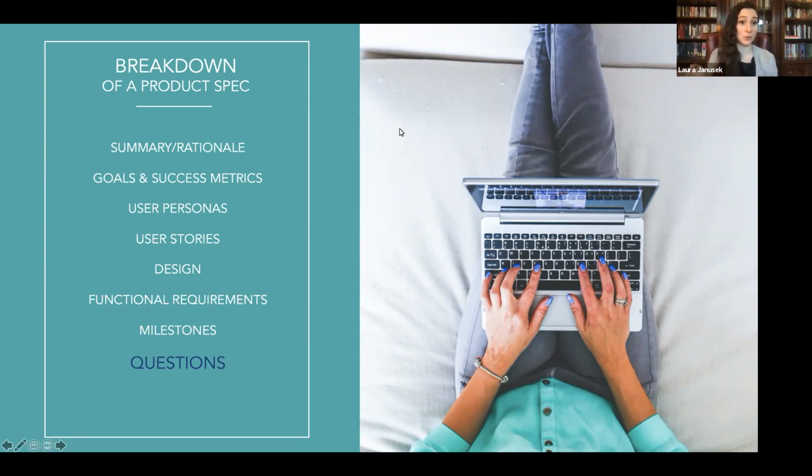And then dev notes, which usually my dev manager will fill in, like make sure that this speaks to this API or whatever, stuff that's a little over my head. And I'm like, yeah, good to have that written down for the developer, not really part of the feature, not part of the description, but that's your area to fill in what you will. And then we have an area for open questions, calling out again, like, we're not yet sure how this is going to play with the mobile version or something. And so that's just like a mini spec inside of every ticket. That's how I organize it, but different people do it differently.